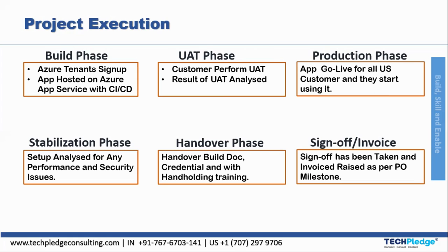Next is User Acceptance Test (UAT). The customer performs UAT after the build phase and the results are analyzed. If UAT fails, everything goes back to the build phase for corrections and UAT is repeated. Once UAT is validated and passed, the application moves into the Production phase, where it goes live for all customers who start using it. After production, the Stabilization phase analyzes the setup for any performance or security issues, bugs, and overall stability.